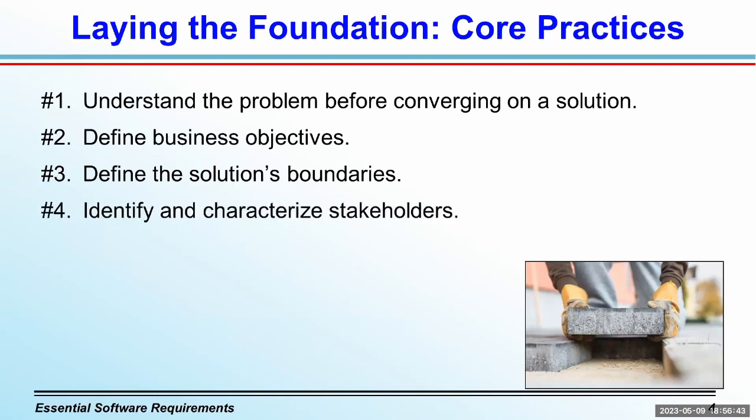Every project has stakeholders who are individuals or groups who are actively involved in a project or are affected by the project or can influence its direction. You need to cast a large net to identify many potential stakeholders. Then you can focus down and decide who can best represent the needs of each stakeholder group and how the team will engage with them.